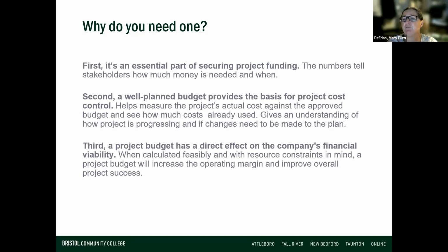So a lot of times before you even know you have funding for your project, you need to submit a budget, because it tells them how much money you need and when you need the money. It also helps you with cost control, okay? So if you know that every month you're comparing your actual costs to your budgeted costs, it helps you know when you have made a profit and when you are still breaking even, okay? And then if you're consistently making a profit, then maybe there's your opportunity to grow.